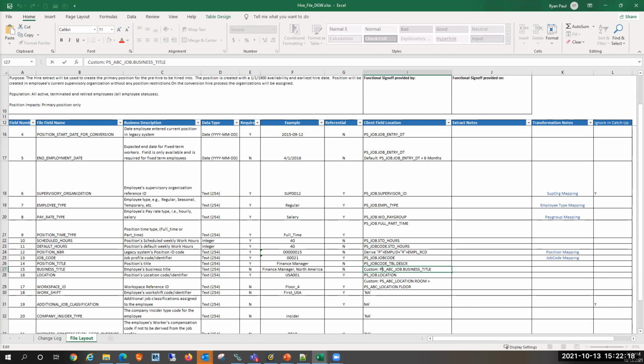So the initial decision point is, are we going to continue on with this third party, or are we going to switch to using the features of the new software because it provides the same thing? And once you make that decision, then it becomes a decision of whether it is conversion or integration.